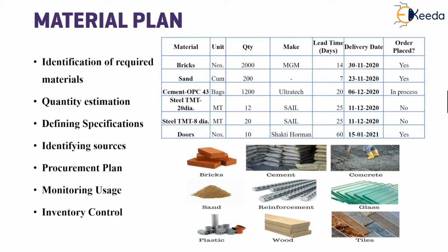Next, we come to material plan. This involves identification of required materials, estimation of its required quantities, defining its specifications, identifying sources, procurement plan, monitoring its usage, and the inventory control.